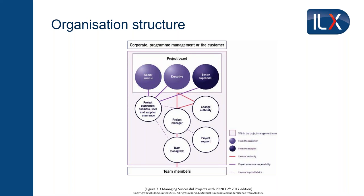The project board's purpose is decision making. Although there are three roles, there's only one executive, but you can have multiple senior users and multiple senior suppliers. If you put too many people on your project board, decision making can become slightly flawed. Always try to keep it as small as possible — have the right people who can represent all the views of the users and suppliers and make decisions effectively.